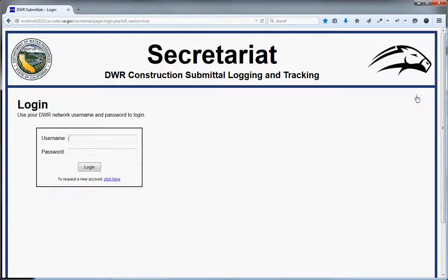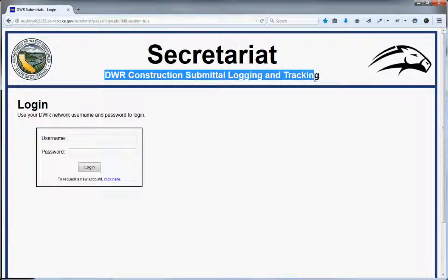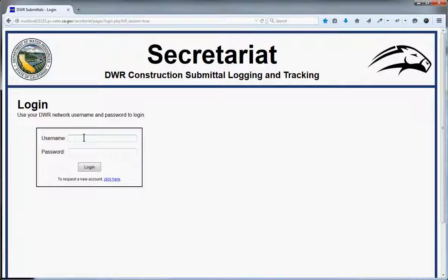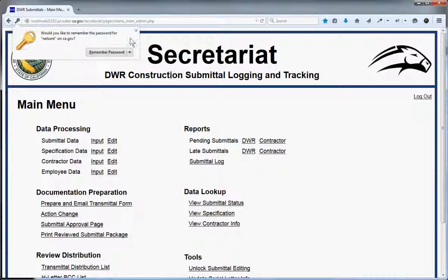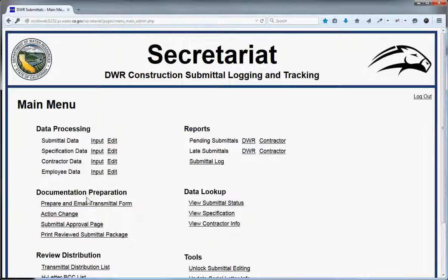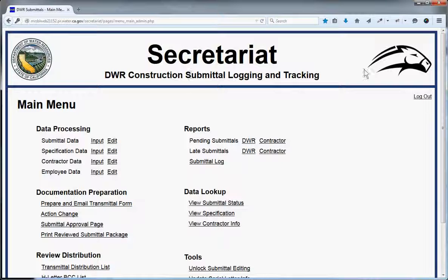This video briefly explains Secretariat, the DWR construction logging and tracking application that the Department of Water Resources uses in Sacramento and throughout the state. The program is used for logging and tracking submittals for construction-related projects. What used to happen years back is the contractor would snail mail actual pieces of paper into the department so that reviewers and engineers could make sure construction projects were built with appropriate materials. They reviewed the paperwork, sent it back — it was slow, tedious, and expensive. Now we have a web app called Secretariat, named after the horse.